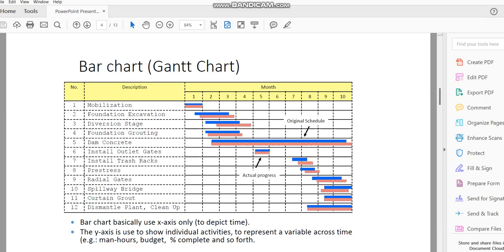So basically, you need to know, okay, mobilization consists of what smaller activities, and each smaller activity takes how long, and then every activity to be completed is from 0 to 100, obviously. Okay. So usually we'll base it on the quantity of work.